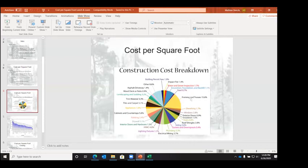Now, this is where it would be a different percentage, because in a log and timber frame package, you're basically replacing the framing and the conventional lumber that goes to building those structural components. That's what we're doing: the log walls, the timber floors, the timber roof, the timber porches. So that percentage may look a little different within your pie chart, therefore altering the price a little bit. And that's why I was saying earlier in qualifying, when you look at the national average for log construction being relatively low, that's primarily because most of your suppliers are just providing log walls. They're not doing timber floors and timber roof systems and timber porches.